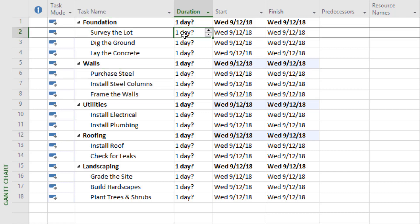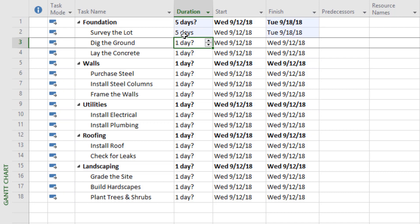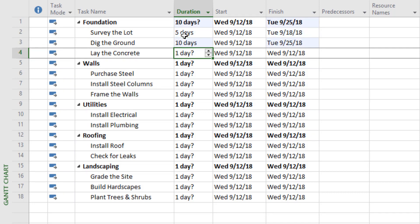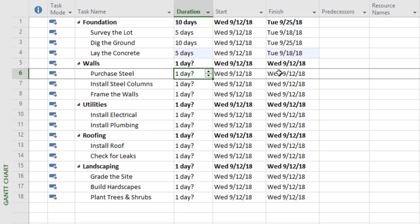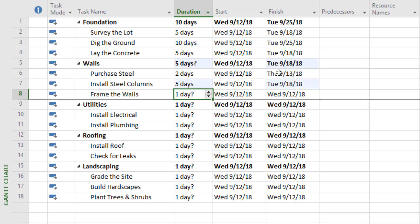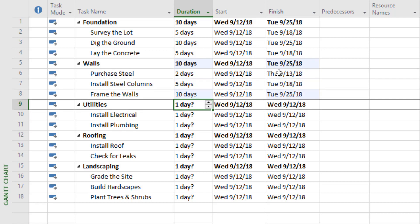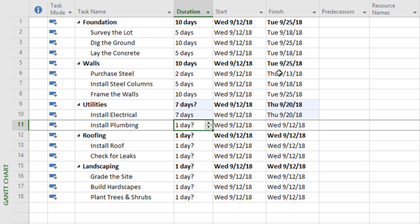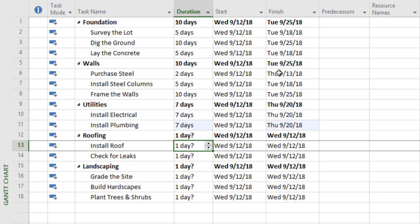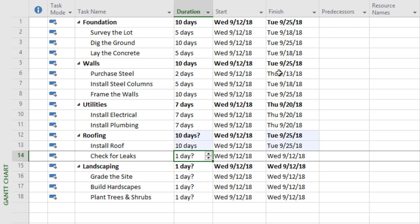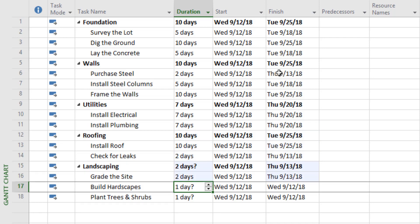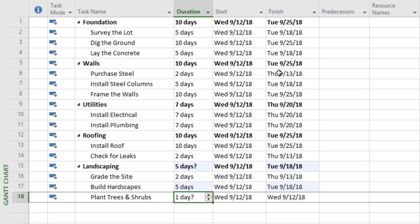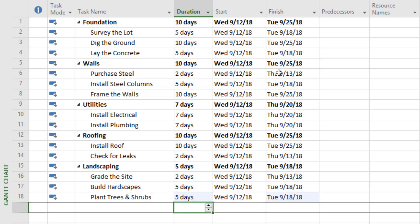Surveying the lot is going to take five days. Digging the ground, let's say ten, and laying the concrete, five days. Purchasing the steel takes two days, installing the steel columns five, and framing would take ten. Installing the electrical and plumbing, we'll give that seven days each. Installing the roof is ten days, and checking it for leaks is two. Grading the site is two days, building the hardscapes is five, and planting trees and shrubs is five days as well.